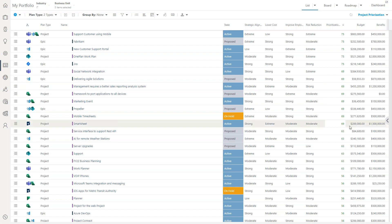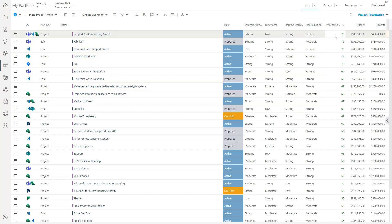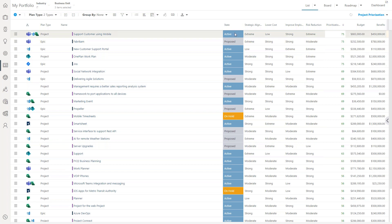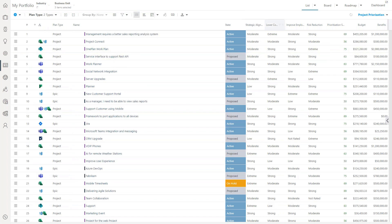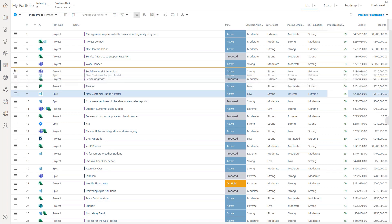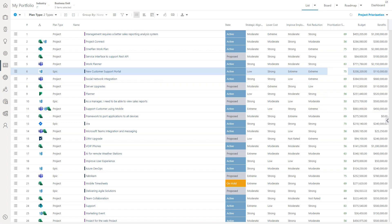With a portfolio of candidate projects and their prioritization scores — some still proposed — you can decide whether you can do all of them. You have a ranking of projects that may not purely reflect the prioritization scores; for example, you might have compliance projects or executive preferences. You can take this ranking and force-rank projects — deciding that project number nine really needs to be at number six, for instance — doing manual reprioritization and force ranking.